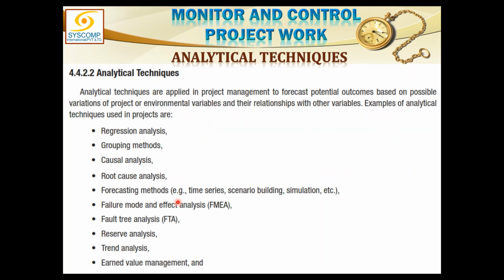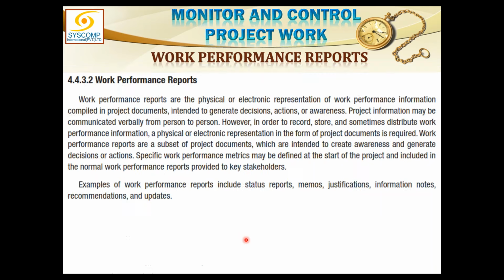Analytical techniques could be many. You could use statistical tools like regression analysis, grouping methods, causal analysis, root cause analysis, and many other things. Some you may know, some you may not know, but all those things and mechanisms are sometimes to be used in these various kinds of monitoring and control, depending on the type of project. Mostly we do the reserve analysis, trend analysis, earned value analysis, variance analysis, causal analysis, root cause analysis. FMEA is not very common. Fault tree is for specific purposes. But you see, it all depends what kind of project you are doing. So you use the relevant tools.